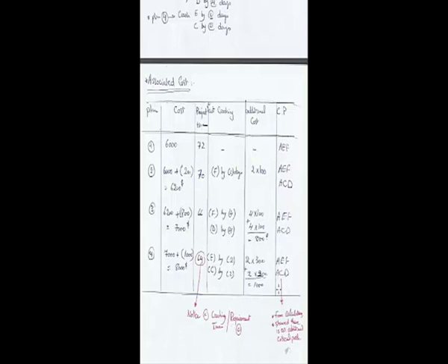And AEF and ACD from the calculations also in this point showed that we are going to get 2 critical paths, if you can remember. We'll see them here. When we calculated the original critical path AEF, the crashing time for it was 64, but when we looked at other paths, we have noted that ACD will get also the same amount of days. So it made us notice that we're going to get 2 critical paths and not only 1. Okay?